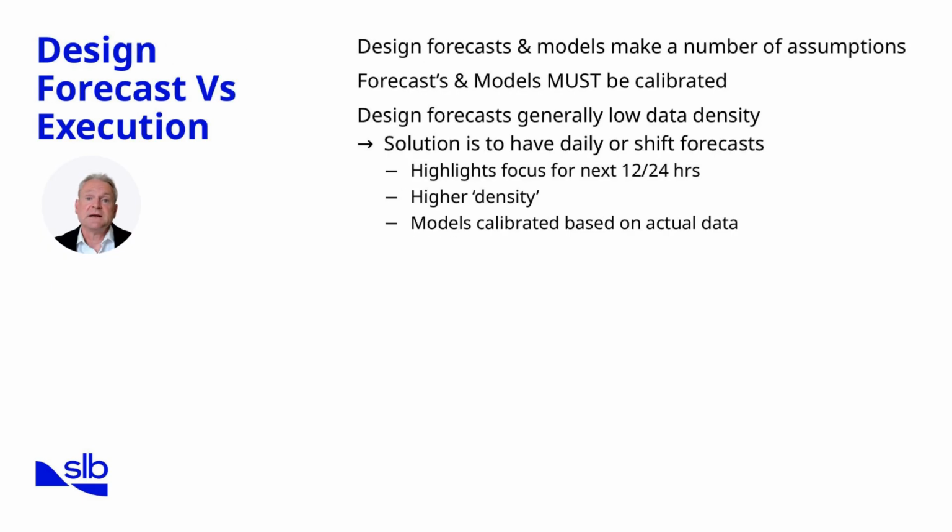Design forecasts and execution realities often diverge, and understanding this gap is key to optimization. Forecasts are built on assumptions about formations, equipment performance, or crew efficiency, but once drilling begins, these assumptions must be calibrated with actual data. One issue with design forecasts is low data density. They typically provide broad estimates that may not reflect daily operational variation.